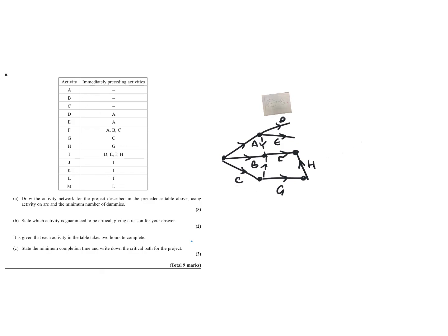I'm going to move E and make that go to F. Brilliant. Now what I noticed about D is because D and E both are dependent on A, they can't both now go to H. It's not allowed. So I have to use a dummy. Okay. So there we go. This is a dummy. Now from here, I is dependent on this. So that's fantastic. I.